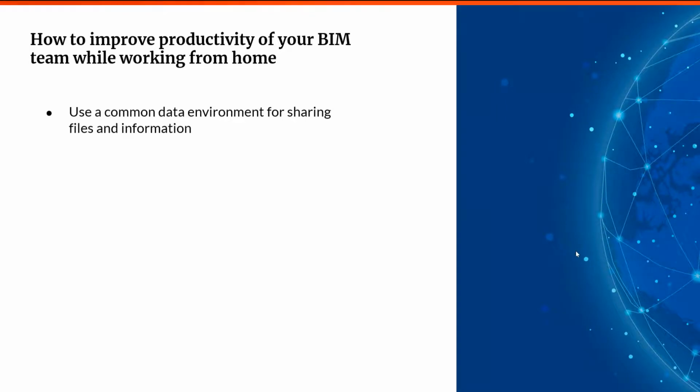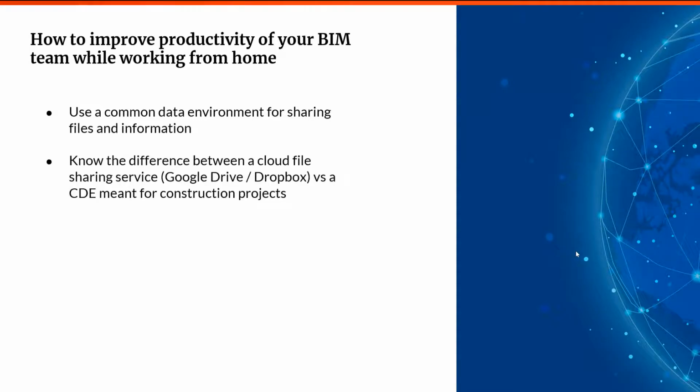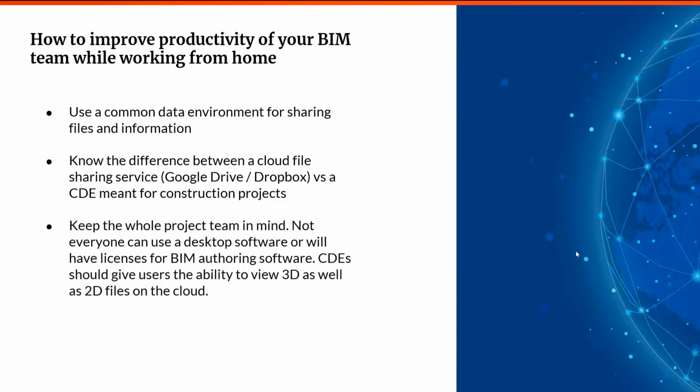Then I would suggest that you definitely use a common data environment for sharing files and information. At the same time, know the difference between a cloud file sharing service and a CDE meant for construction projects. I've seen a lot of people who use Google Drive, Dropbox, or just a file sharing service, and they call it a common data environment. Well, that doesn't really fit the common data environment definition as per PAS 1192, as well as the latest ISO standards. So know the difference between both of these things, and accordingly make sure you implement that.